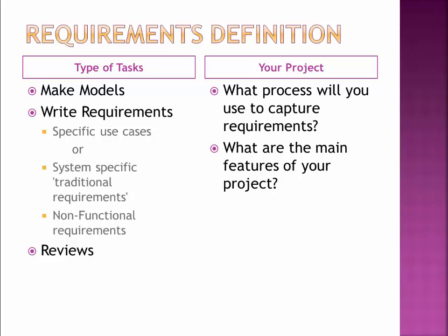We might have a bit more traditional requirements approach if you're taking that approach to say write requirements, but the better approach is you could say write requirements for the admin site, write requirements for the phone app, but you could break it down, say the iPhone app versus the Android app, or you could break it down even further and say write the security requirements for that, get into the non-functionals and things like that. It doesn't have to be ridiculously large for this class, but you might be more specific to be able to give you granularity. We'll talk about the scheduling and stuff like that a little bit later, but just want to get the idea that these things should be specific to your project.